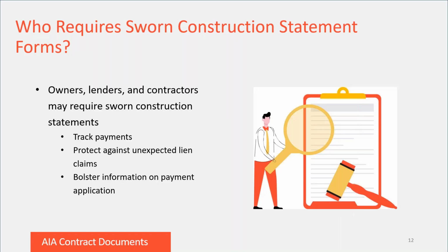And for sworn construction statements, who requires these? Well, it's sort of a mixed bag. Owners, lenders, prime contractors may all require sworn construction statements be submitted as part of a pay-app. Sworn statements can be used to track the payments made to subs and suppliers and in turn protect against unexpected lien claims. They can also be used to bolster and cross-check information found elsewhere in a contractor or its sub's payment application.